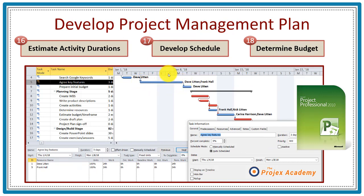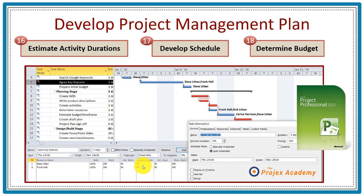You can build in project calendars to show non-working days, which will automatically be taken into consideration. Within each resource they'll also have their own individual calendar, so you can show when they're away for training or annual leave. You can track at the most detailed level how much work they've done and how much work is remaining, which will help you in forecasting — completing step sixteen, estimate the activity durations.